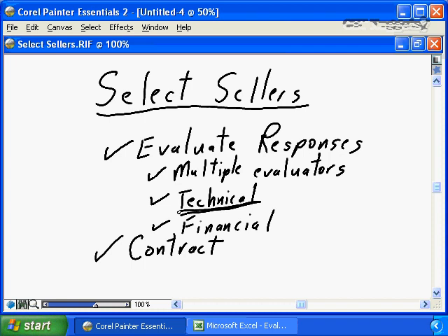The statement of work ideally would be a straight carbon copy of the scope statement going into the procurement process, but often when the vendor does not have full compliance to all of your requests, you will need to modify the scope statement so that the vendor is then bound to deliver based on the modified statement of requirements, based on the modified scope, to ensure that you're dealing with all of the issues that the vendor can satisfy for your project, and that you, the project manager, understand how the vendor is going to address that. So the contract has the legal aspect.